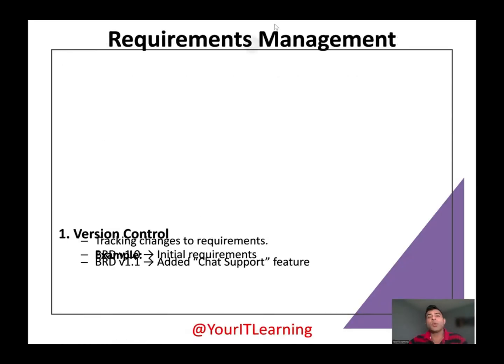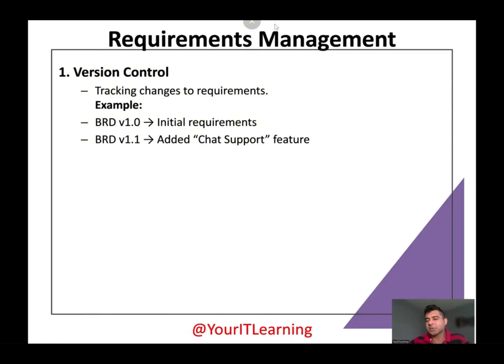Requirement management, version control, tracking changes to the requirement. So when you're working on a requirement document, either functional or business requirement document or any kind of document, it's always helpful to track the changes. Okay, so tracking changes to the requirement. BRD version 1.0 is the initial requirement. BRD version 1.1 adds the chat support feature.